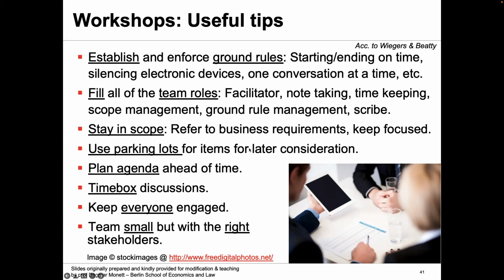A really good idea, and useful tips for having workshops, is that you please enforce all the ground rules beforehand, so that there's no time wasted on extra items. Then you have all the team roles assigned beforehand. There's a facilitator, there's a scribe who is going to be writing all the interactions taking place, and you make sure that they stay in scope. And then there's this term called parking lot. Parking items in a workshop are the off-topic items that can be a distraction from the main topic, right?